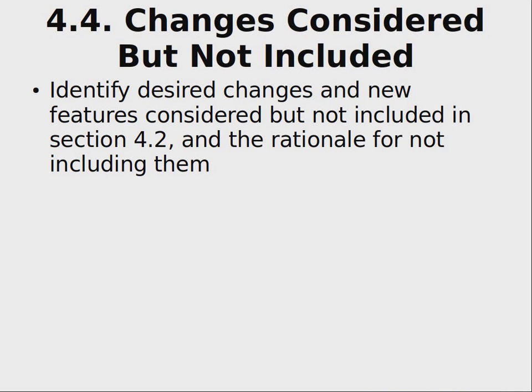Then again, because of these feasibility studies, what the business owner can afford, you may describe changes considered but not included. For example, it would be nice to have this additional model for the system. It would be nice to change this to that, but then you describe why these changes are out of scope of this current concept, because in most cases it is just lack of time and lack of money.